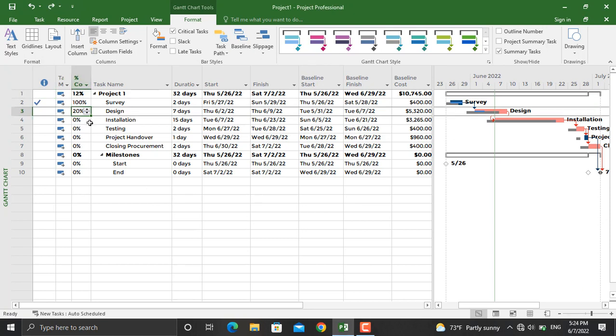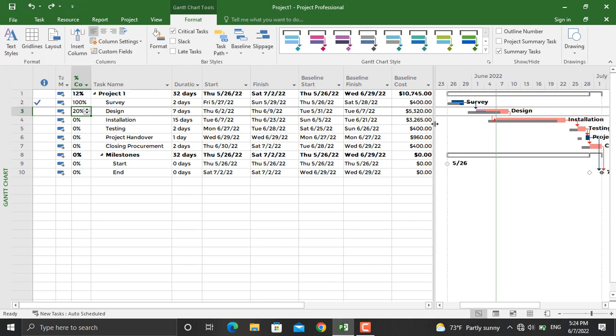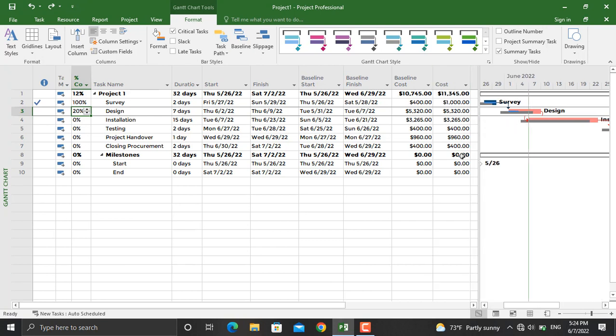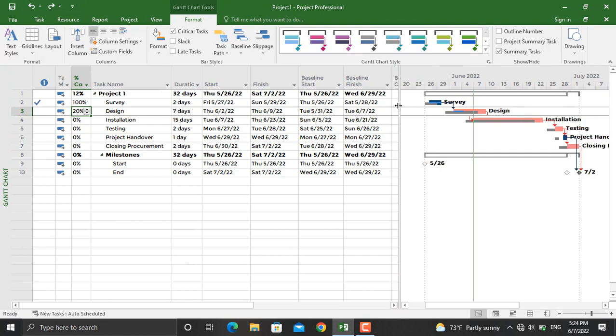Make sure you have actual cost and baseline cost updated for your project schedule. In the video for the earned value report, we made some updates to our project schedule. For example, we changed the actual start date of the survey activity.